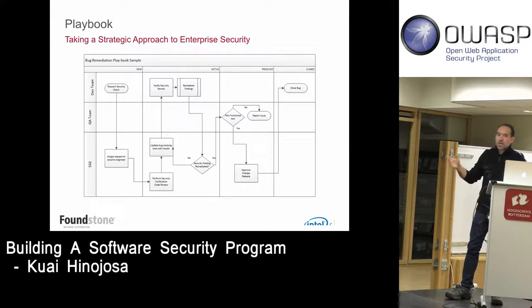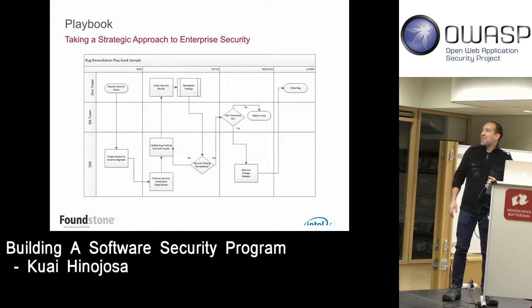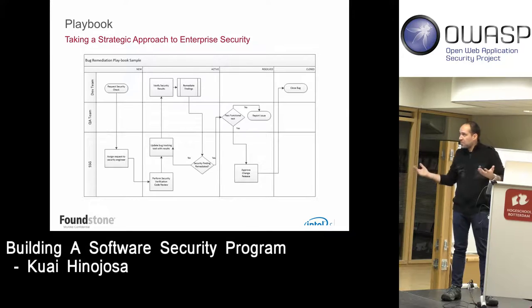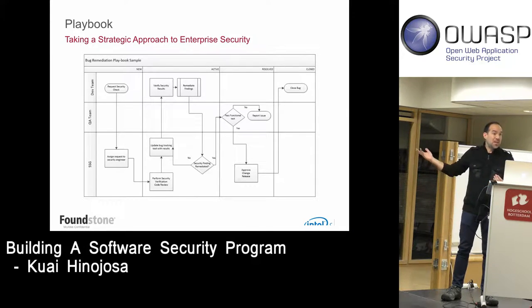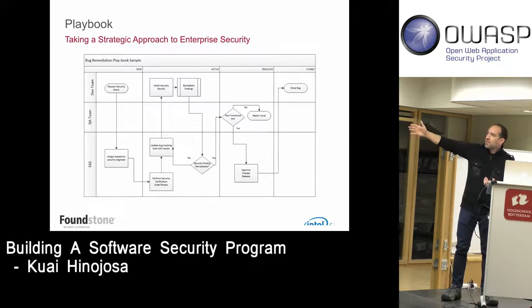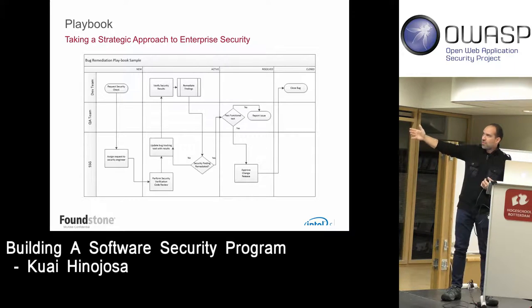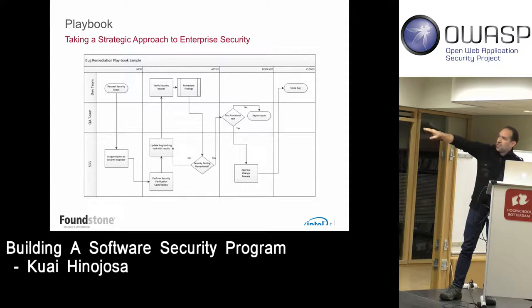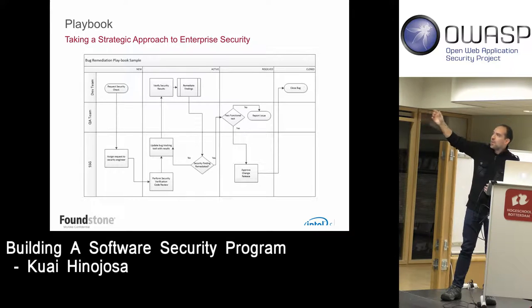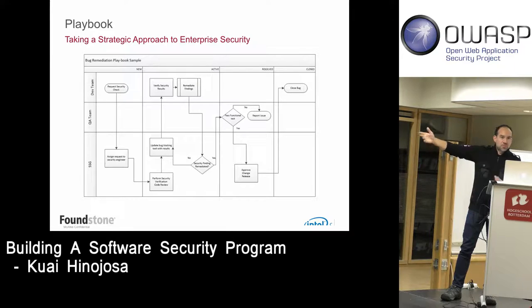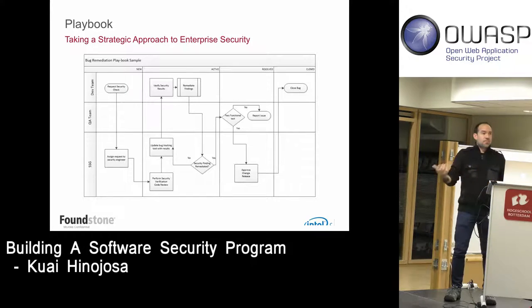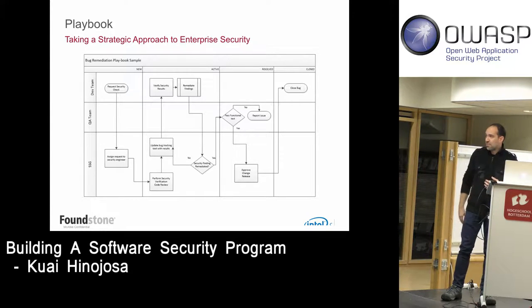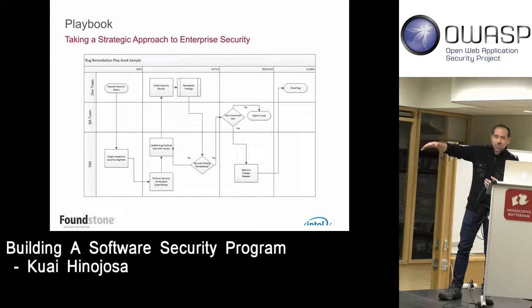Another thing I've been pushing is what we call playbooks — cross-functional swim lane charts that break down the process and set expectations. This is our bug remediation playbook. You can see the SSG (software security group), the QA team, and the dev team. Usually the dev team requests a security review via a ticket — we used TFS (Team Foundation Server) for everything. Our team grabs the ticket, performs a code review and runs tools, then provides results through TFS assigned to the right developers. We wait for them to commit the fix, verify it was fixed, let QA do functional and regression testing, and then deploy to production and close the ticket.